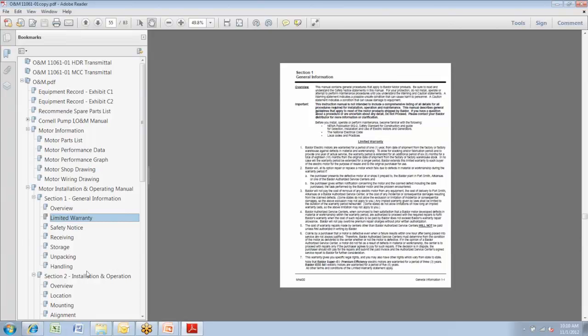So if you're going to require the contractors to do it, you want to make sure in your specifications you tell the contractors we want it in PDFs, we want table of contents, we want links, we want this relationship, and tell them what information to do it. Is it a PDF per piece of equipment, or is it a PDF per spec section? So when you're defining those requirements in your specifications, when you're working with your designers on those specs, make sure you put in the details.